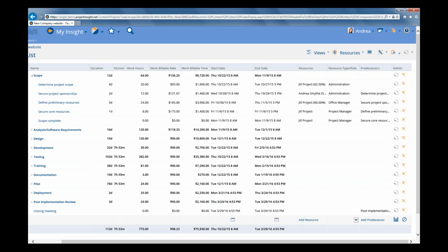Now, in some circumstances, you may want to set a specific rate card for a customer. So you might want to bill them at the standard rates. However, you still want to record the fact that you're doing a project for a certain customer and you want to bill them, but you want to bill them at your company standard rates instead of the specific rates that apply to them. In order to do that, you don't have to copy the standard rate card to every customer. You just need to change the contract rate that you're applying.